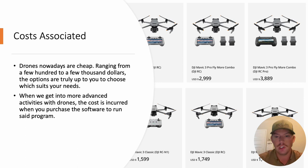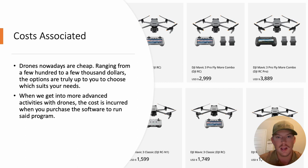Cost associated — you can see in the photo in the background here, you're not going to be breaking the bank. You can put this into the job cost whenever you bid a project, but you're going to carry these drones from project to project. There's no job-related cost; it's kind of a one-time thing. Normally your company, the general contractor, is going to buy them and keep them as more of an office expense rather than a job expense.